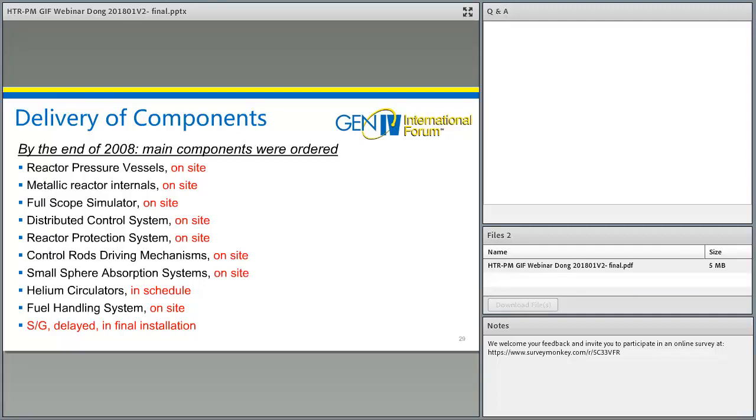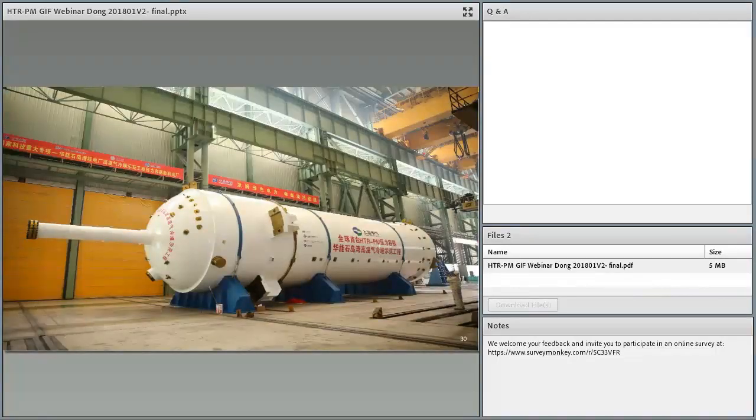The steam generator is delayed. The steam generator is the most difficult piece of equipment to manufacture in many of its aspects, including materials, rolling and bending the heat transfer tubes, assembling the heat transfer unit, final assembling, welding, special tooling and workshops, and so on. Currently, all assemblies and tool vessels have been provided. They are in final assembling in factory.